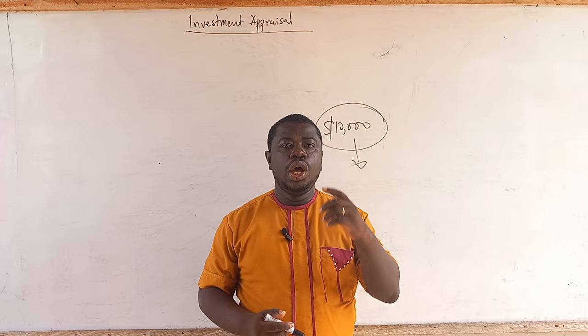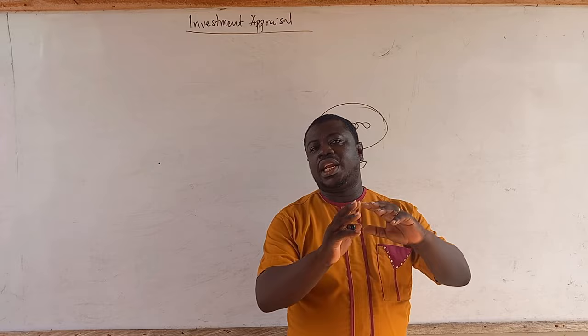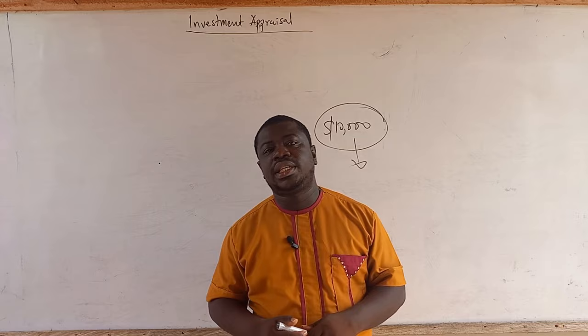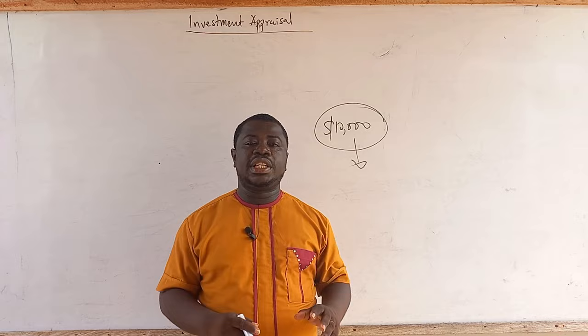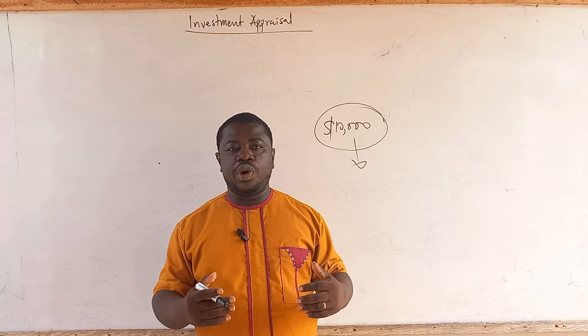We are going to look at two different approaches to investment appraisal: the discounted cash flow methods and the non-discounted cash flow methods. The discounted cash flow methods take into consideration the time value of money, while the non-discounted cash flow methods do not factor in the time value of money in terms of the return of the investments.